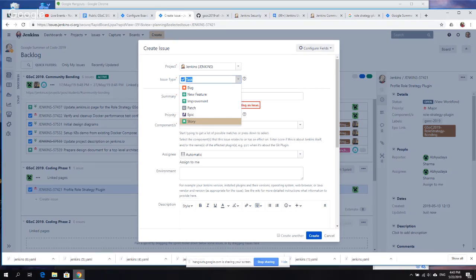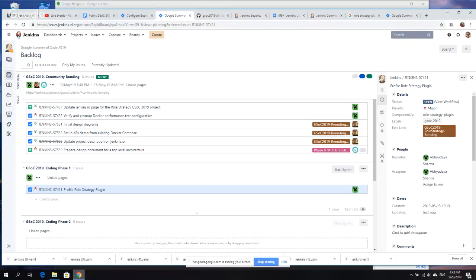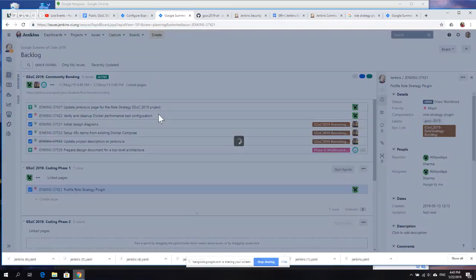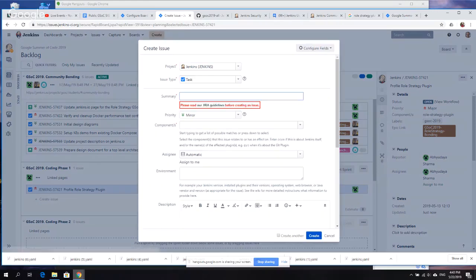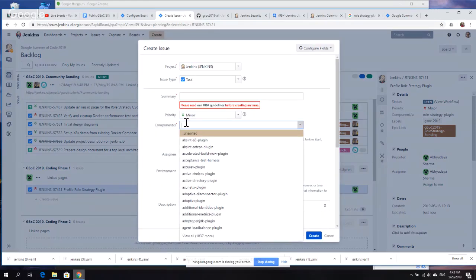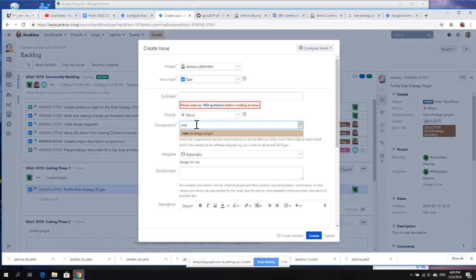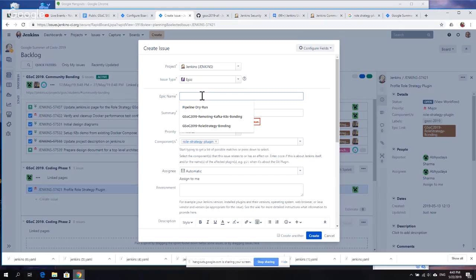To clarify, an epic is a grouping, typically over a period of time which is longer than a sprint. That's not necessarily so. It could be longer than a sprint and it could be shorter than a sprint. My personal approach for epics is that I use epics for deliverables. For example, let's say I have a Full Bar plugin and I have an epic, Full Bar alpha release.